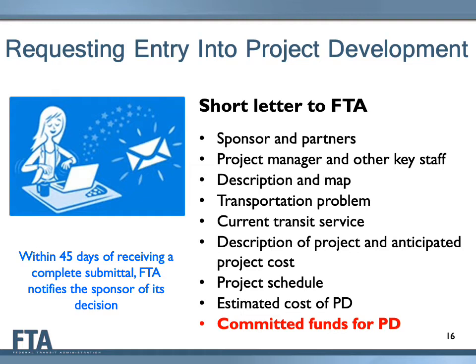Most importantly, as shown in red bolded text on this slide, in a project sponsor's request to enter project development, it must demonstrate to FTA that funding is available and committed to perform the project development work. Project sponsors must have money available to begin the project development work immediately upon entry into the CIG program. Funding available 1 or more years in the future does not qualify as available and committed for entry into project development, even if it is programmed in an official funding document or budget.